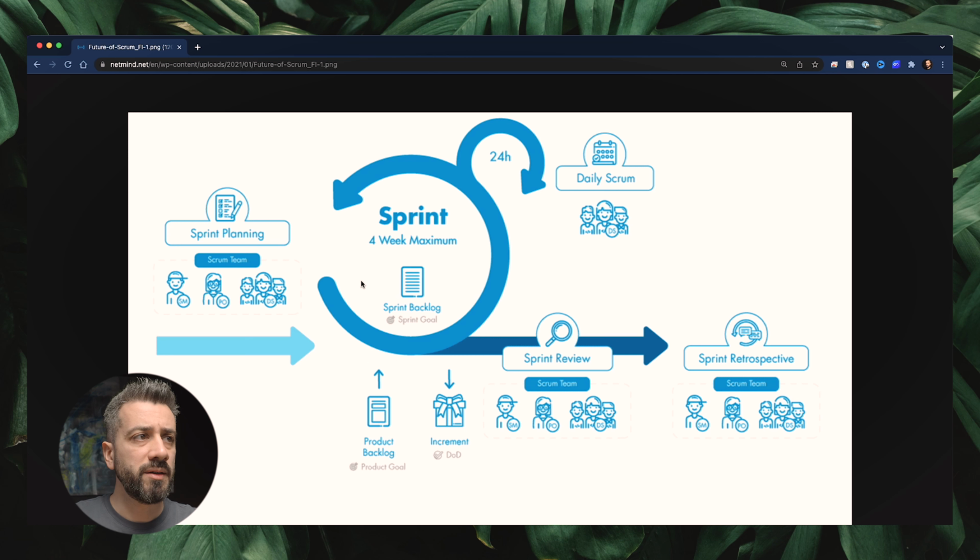So the backlog refinement is going through the stories for the next few sprints. So we try to plan and refine stories not too much in advance. So we try to tackle stories that are in the next couple of sprints. So we can have a backlog with a number of stories that are ready to be picked for next iteration.